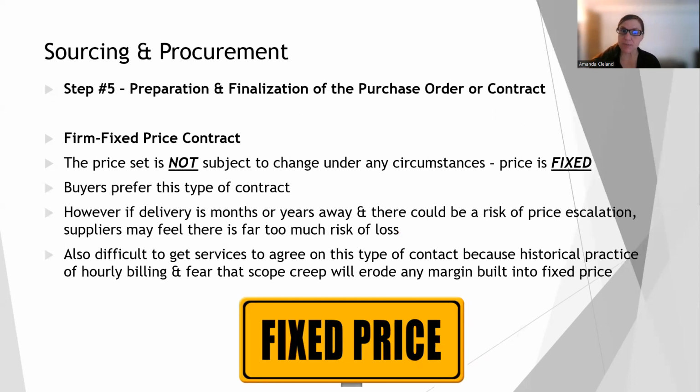So firm fixed price contracts, sometimes you'll hear the term FFP, or fixed price contract. With a fixed price contract, the price is set and it's not subject to change at all. You cannot change it under any circumstance. This price is fixed. Most buyers prefer this type of contract. We want to lock in a good price and ensure that this is the price it's going to be regardless